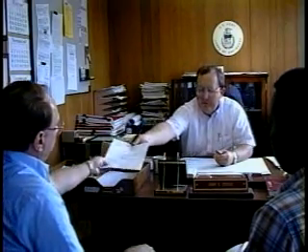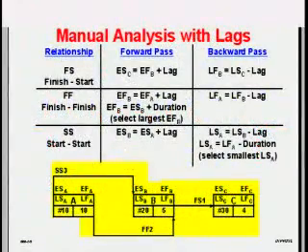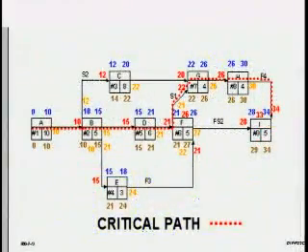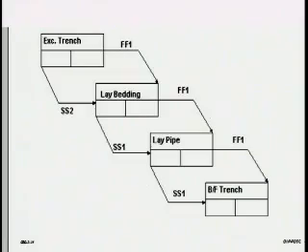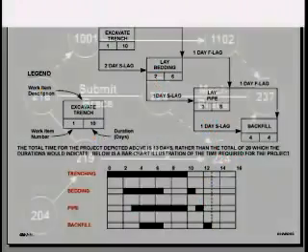If it's determined during the course of the project that QC personnel are not satisfying submittal requirements, corrective action will be taken. Submittal activities may be required to be incorporated into the construction schedule for submittal progress to be tracked in conjunction with overall progress. Care must be taken that the schedule accurately reflects the current submittal status.